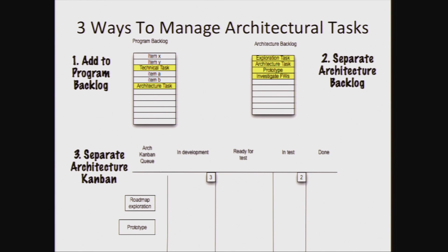So another thing to think about is if you are in a larger team or project, you may want to make architecturally relevant tasks visible. I know teams have done it different ways. One way is to directly add certain technical tasks and tag them on your backlog so that they have a different color. We know that those things are not stories. These are technical things that we need to enable what's going to follow.